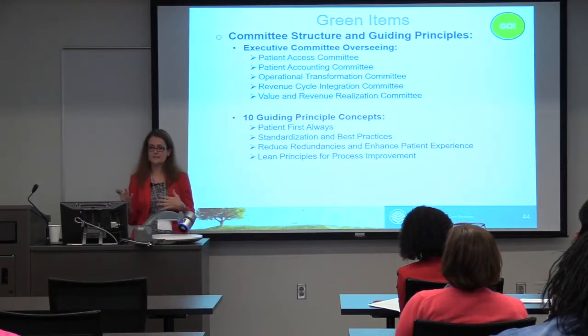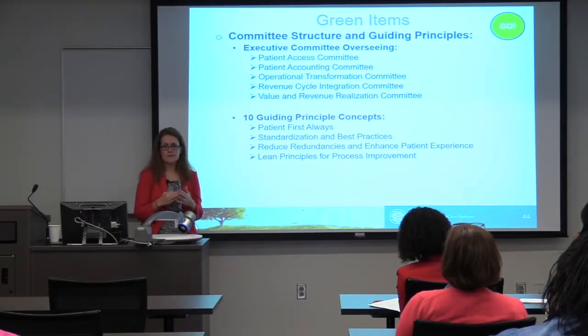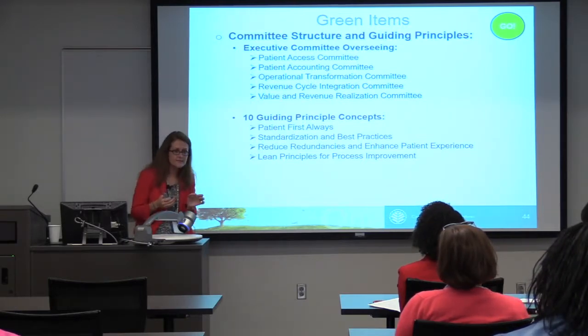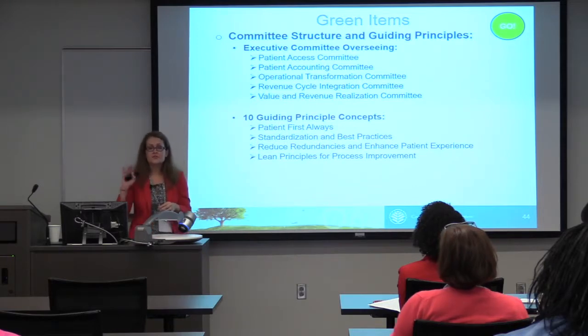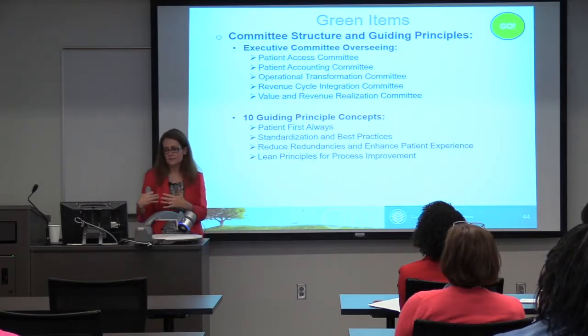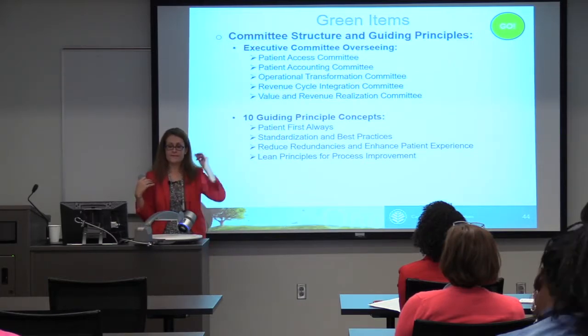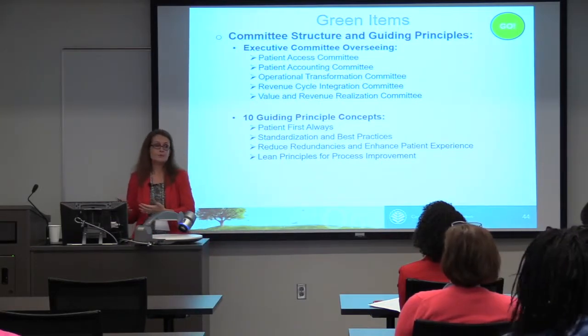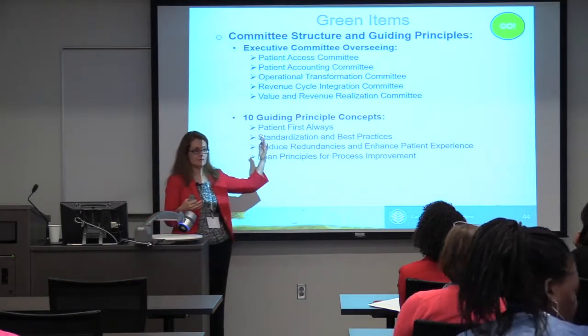Each one of these committees has a purpose, and for example, the Operational Transformation Committee, one of its big responsibilities is our timeline. So right now we're pending a decision for our exact go-live dates, the 11th and 14th, hopefully, in July. So it just gives you a taste of how each smaller subcommittee makes different decisions that impact the whole project. But the chairs of the subcommittees are on the executive committee. So basically they're able to bring whatever items are approved that need executive oversight to the executive committee.